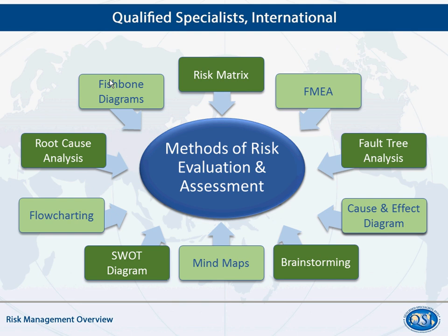When you identify the risk, you may want to keep a list of potential risks and issue a priority code to them, like high, medium, low priorities. If they don't present an immediate risk to your business or to health and safety, you can go back and look at them when you feel it's timely. Anything that's marked as a priority or a high-level risk, you probably want to look at sooner rather than later. But there are a lot of different methods of evaluating risk.